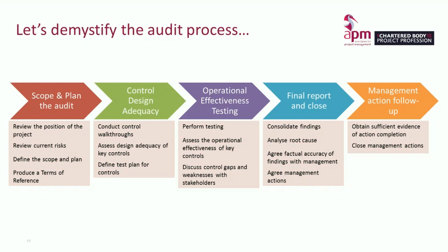It's obviously a decision-making forum with an agreed mandate. For design adequacy, we would look at the terms of reference for the forum to understand its purpose. We would review the attendees, the meeting frequency, its inputs and outputs to determine whether we believe it is designed adequately to perform the control as expected. We would then test its operational effectiveness by attending a few meetings, reviewing the information provided, seeing who actually attends, hearing the conversations held, and seeing whether the forum operates as expected and will act as an effective control.